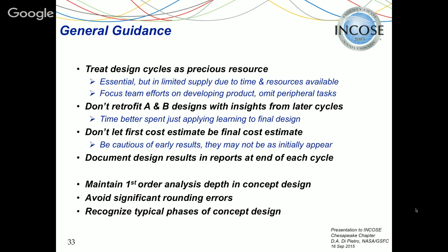Okay, and then document your designs in reports at the end of each cycle. Reports, not briefings. Let the reports be the documents of record. Once you have a report, a briefing can be generated with very minimal effort. And there are a number of reasons to do this. They're in the backup slides and in the paper. Okay, and then three more I'll talk about individually here.